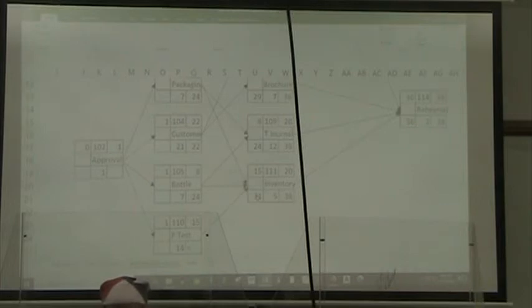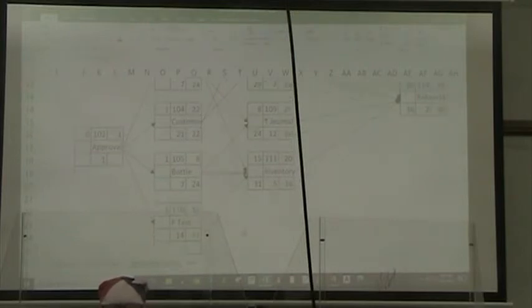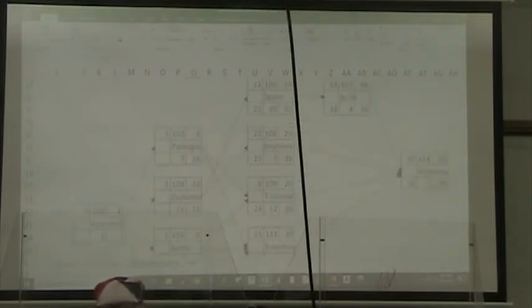And here we only have one choice, so our late finish is just equal to the late start for building wine to inventory. All right, once again, we're just going to go through the same exercise we have before to calculate our late start. Equals our late finish minus our duration.